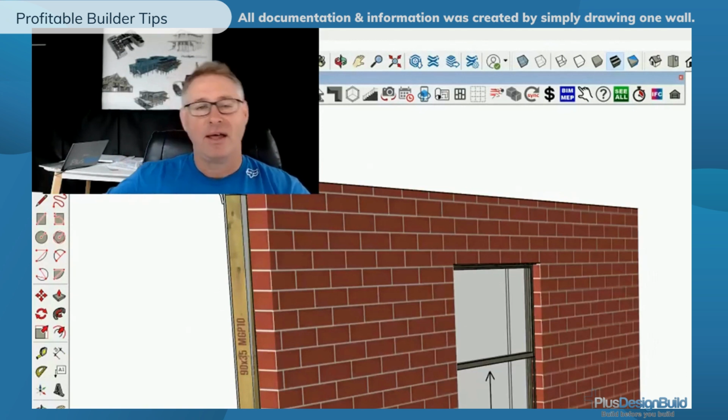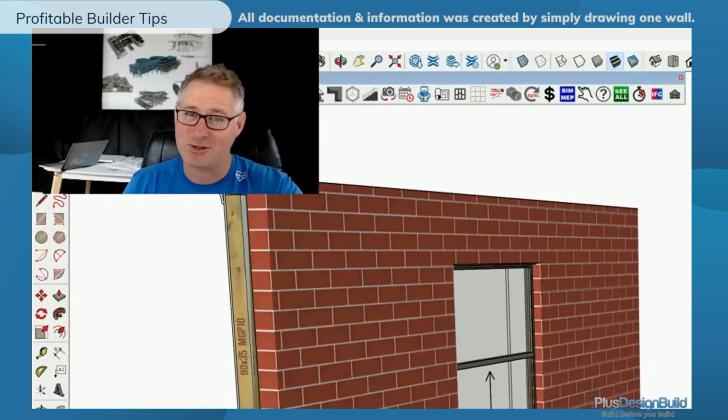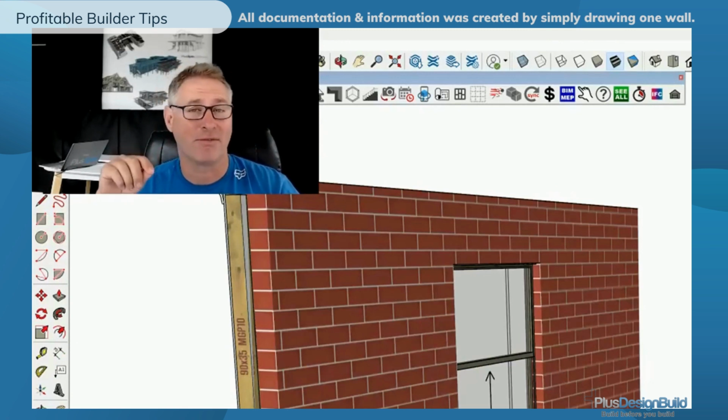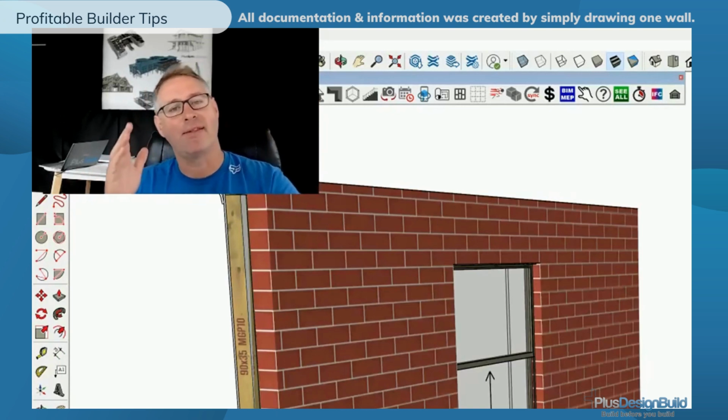Now, invoices start coming in, and if you're a builder and you're actually looking after the whole job, I don't think it's necessary for you to check off the invoices that are associated with a purchase order, because you've already created a purchase order. All you need to know is if the purchase order is less than the price of the invoice. And at that stage, whoever's signing off needs to have an explanation. I would usually say, I need you to create an order for the difference between the purchase order amount and the invoice amount.